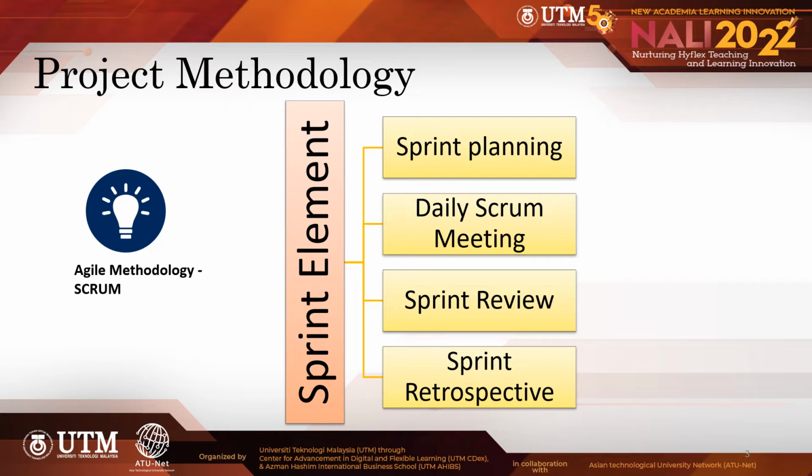Scrum Framework was the chosen agile methodology. The software was delivered in sprints, where a sprint is a time frame to create a piece of usable software. As soon as the sprint is finished, a new one starts. The configuration manager played the role of the Scrum Master.